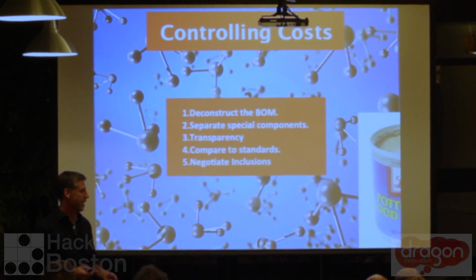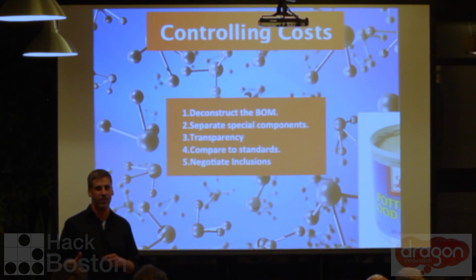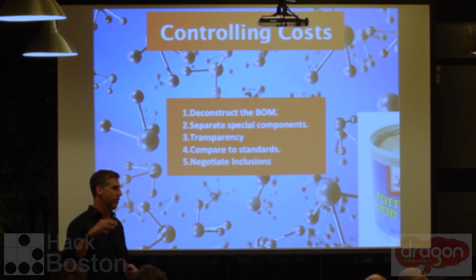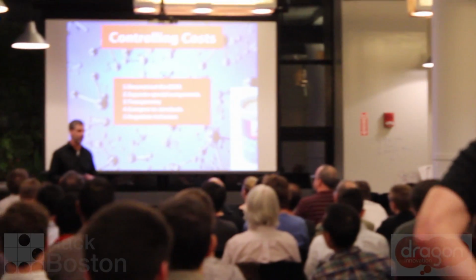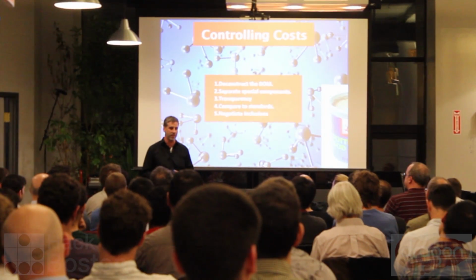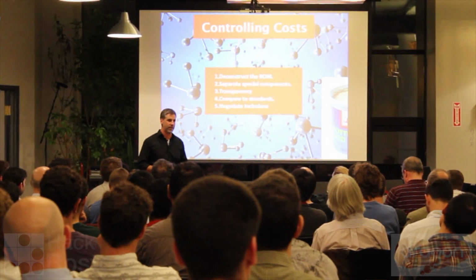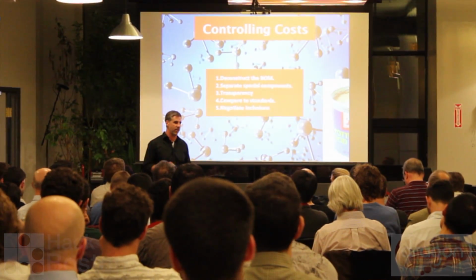The other thing about the mechanics of a BOM is the way the factory makes money is on volume. They might charge you a little NRE, or non-recurring engineering, but they really want you to start selling in high volume. And they will apply a markup to every component within your BOM, including labor. So that's where they double dip. But let's say you have a processor, some sort of Atmel for $3.28. They're going to apply their markup, which for consumer electronics should be 15%, to that.